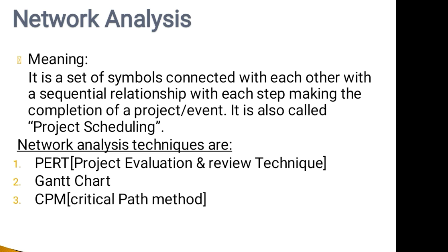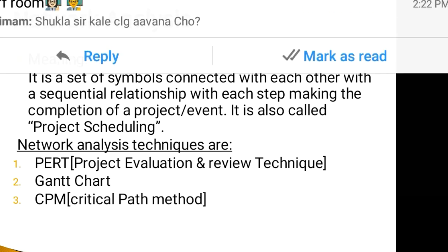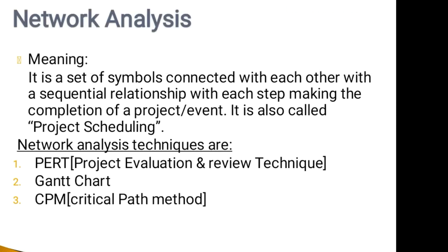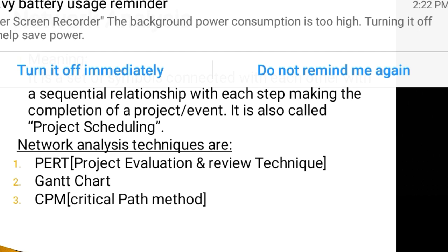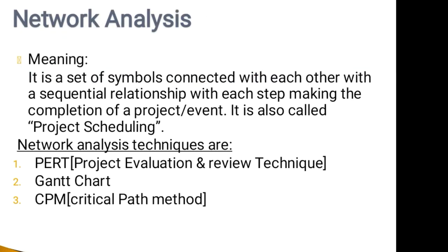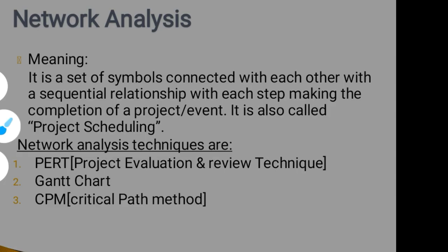And third, the last limitation is that it is useful only if it is updated regularly and decisions for corrective action are taken in time. Due to the dynamism of the environment or situation or future uncertainty, the network time duration and cost need to be regularly updated. Only then will it be successful. So here we are clear with the short note on network analysis.